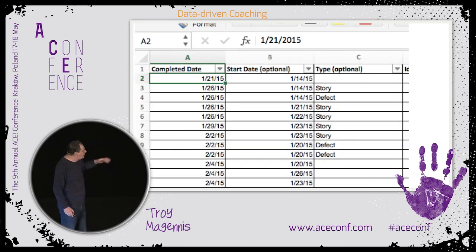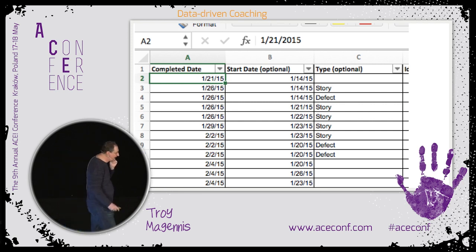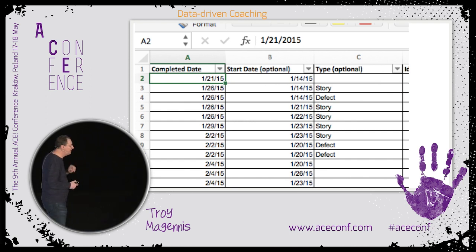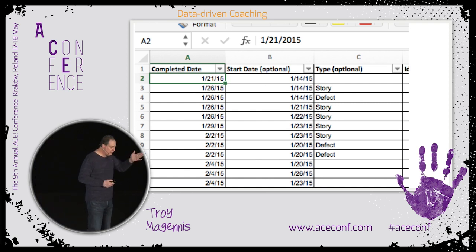So how do you do this? That's great, okay, but how much data do you need to come up with a nice quadrant of measures of those 4 pieces of information? I set out to give people an entry point on how to get a dashboard that has those 4 quadrants of measures without too much work. The only data that you need to collect, and really you only need 2 of these, but we can start with that: you need a date that historical work is finished, a completion date, and you need a start date that work started.